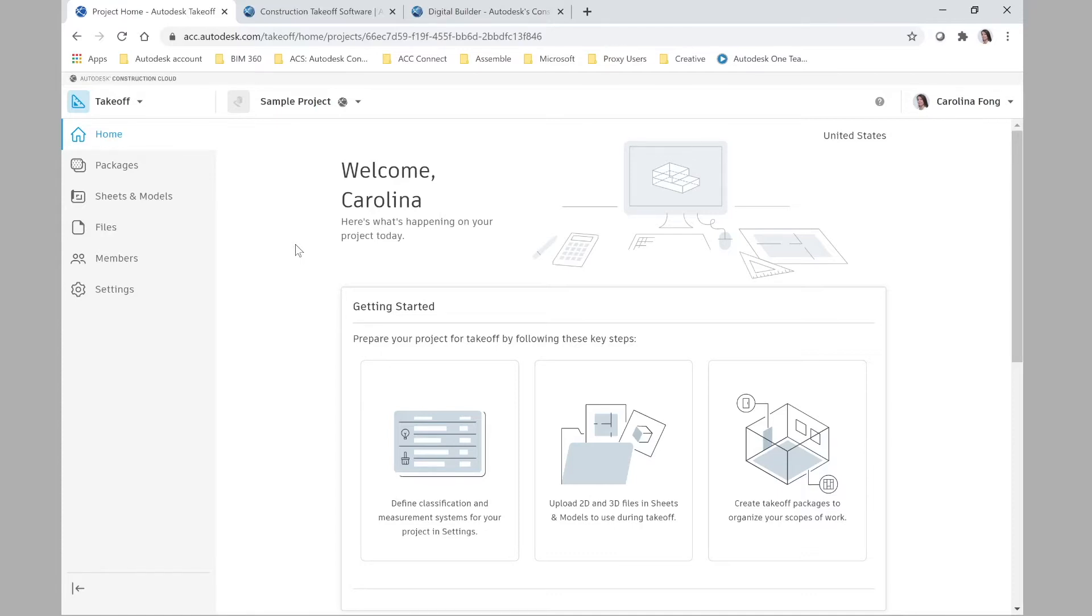Not all of them are even using 3D models. Some people use just 2D sheets and color markers to count all the items for the project and make their estimations, which works fine.